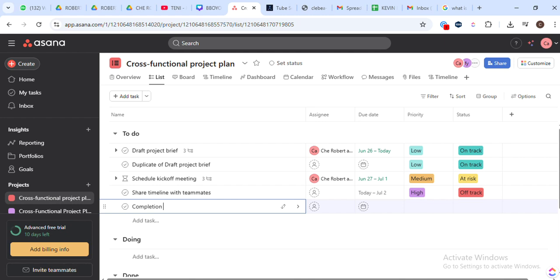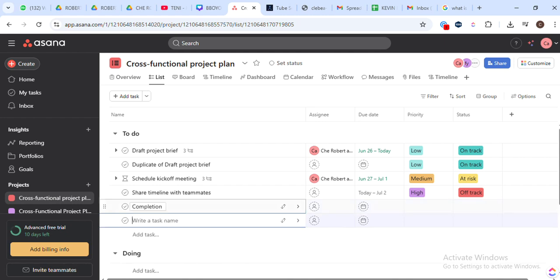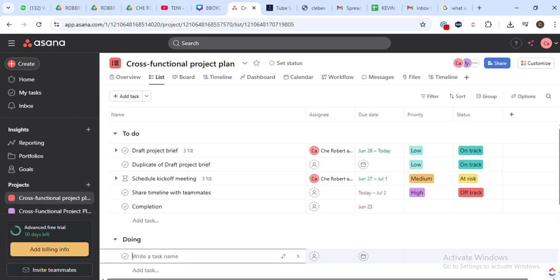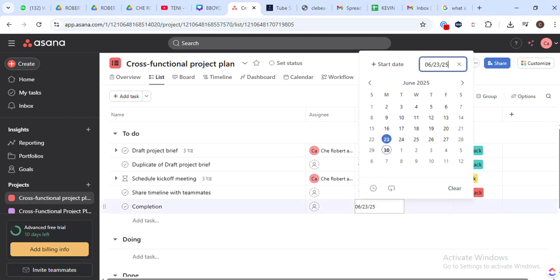Now, once we've done that, you'll want to click on the due date field. Here's where the magic happens. This is where you'll set the recurrence for your task. Click on Set to Repeat and then select the frequency of the task. You could set it to daily, weekly, monthly, or even yearly. The reason we do this is to automate your workflow and ensure no task falls through the cracks.